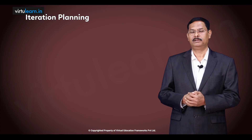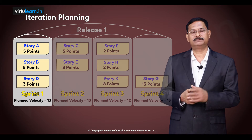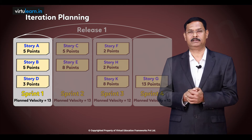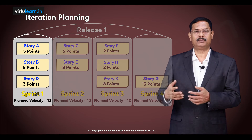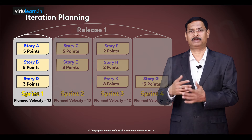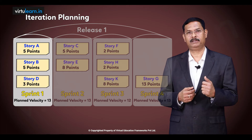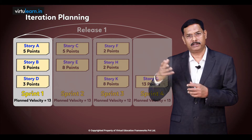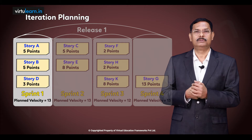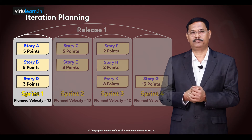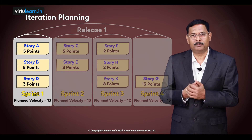When is iteration planning done? If you have already done release planning, you already have some items bucketed as part of your iteration planning. The purpose of iteration planning is to make a firm commitment or firm forecast for the current iteration. Now we are going to re-look at those items and do firm planning so that we will have the iteration commitment possible for us.